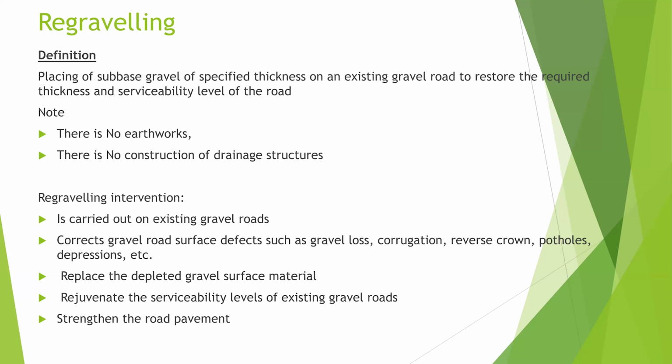So that is for the periodic activities on paved roads. Now we are moving to the unpaved. The first is regraveling. By the classical definition, it is the placing of sub-base gravel of specified thickness on an existing gravel road to restore the thickness and serviceability level of the road.